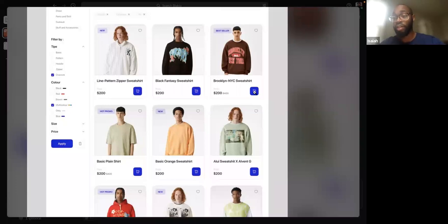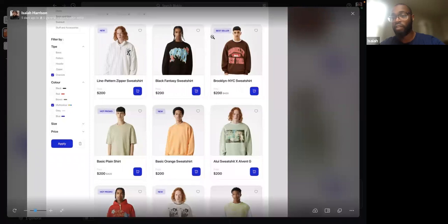What you want to do is break this down into small pieces. Okay, let's break it down. Instead of creating the whole thing, let's make a ticket to just put the image part. This image part is going to take care of the favorite and it's going to, actually, let's break it down even further.